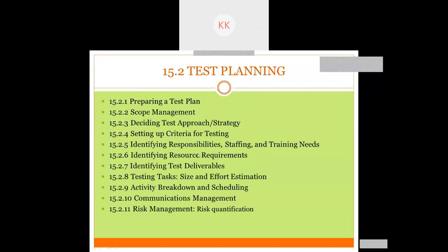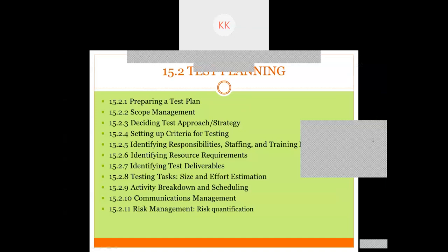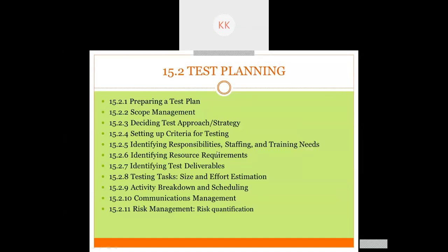There is suspension of tests also, due to different scenarios. If you have a large number of bugs in the test or a new release is there, you need to suspend the test for some period of time, and when the issues are resolved, we can retest the software.